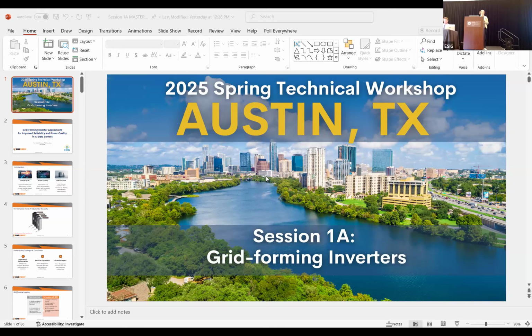We use the testers for development. So if I'm building a new feature, I get to test that it works on weak grid, works with all the communication delays in the facility before it is even deployed to a site. And then lastly, we use it for site-specific testing, like I just mentioned. If we want to bring in an RTAC with third-party code or controls, we can test that not only are the points mapped correctly, but that edge case behavior, which I'll talk about next, is also good, and we're not discovering anything bad on site.